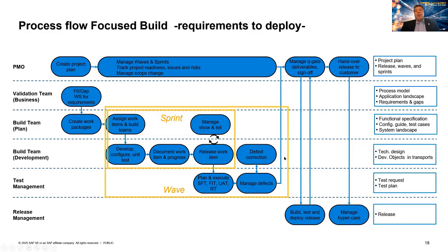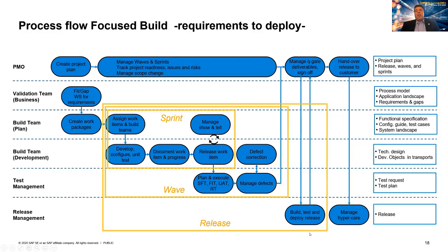And also here, it's relevant that we are processing these test corrections in a protected environment. So this is at the end of a wave, typically, that we are in a frozen zone to have a pure and a clear test environment. And of course, at the end, we do again a release testing before we really set the whole developments and work packages into a go live.